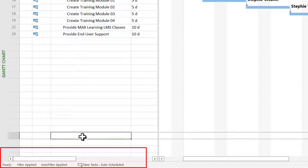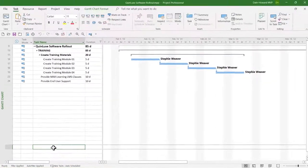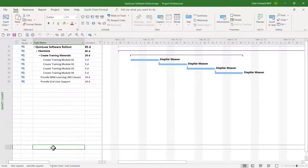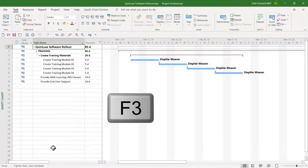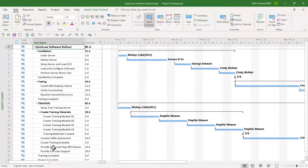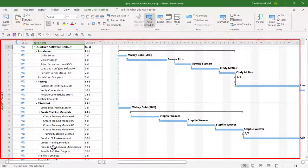The fastest way to clear both types of filters is to use the keyboard shortcut F3 — the function key. If you press the F3 function key, that will remove all types of filters currently applied to your project and show you every task in your project again.